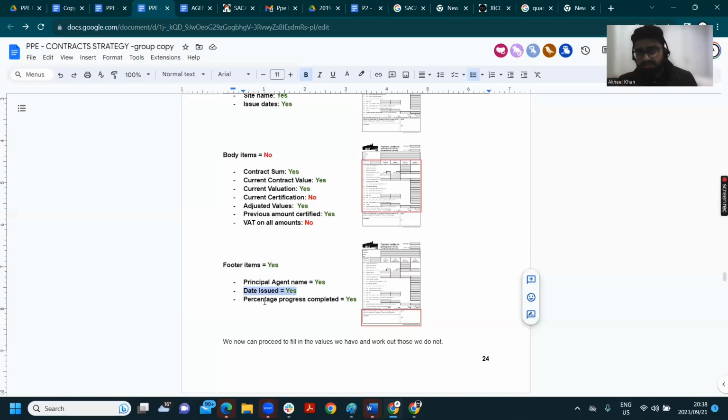The third date that's there is the date where you have to say, what is the latest date you'll get paid by? And that's from the issuing date, 14 days from then. So whatever the issuing date is, it's plus 14. And that's the latest date that the amounts can be paid. That's the latest date. So it can happen anytime before that, but that's the latest date. Just thought you should know that information is really important.